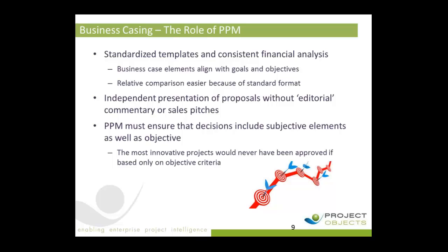It may be nothing more complex than providing standardized templates, which include standard financial calculations, so that everybody who wants to present a business case has to use that same template, which the portfolio management and finance functions can provide some assistance with the completion of. It allows us then to compare apples with apples. We can look at Project A and Project B and decide which one is more aligned with our objectives.